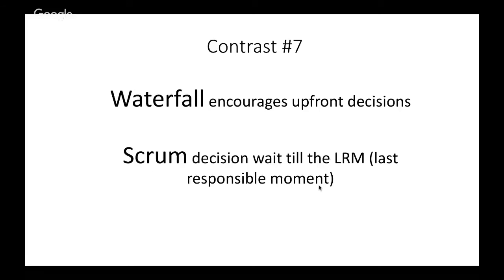In Scrum, we believe that we have the least information at the start of the effort, and that we learn from our experiences and should not make important decisions until the last responsible moment. This is a strategy of not making a premature decision, delaying commitment, and keeping the options open until the cost of not making a decision becomes greater than the cost of making a decision.